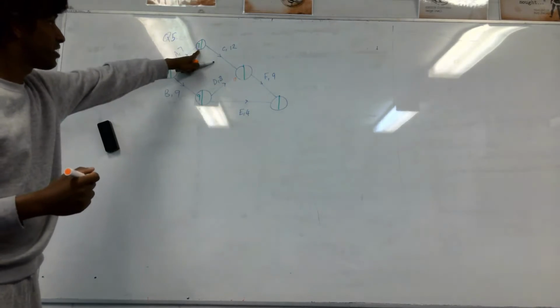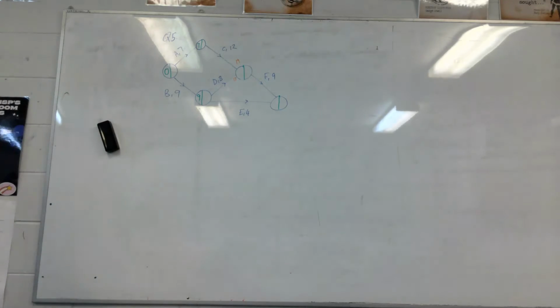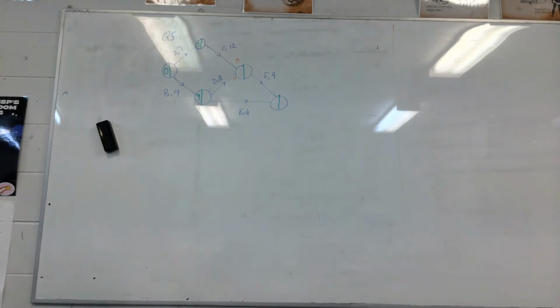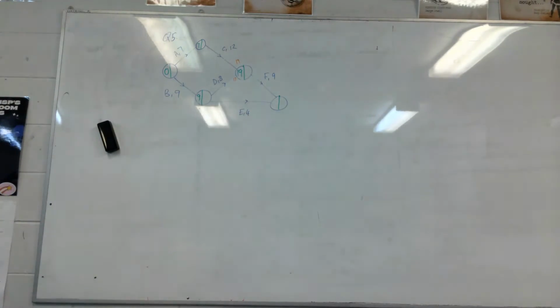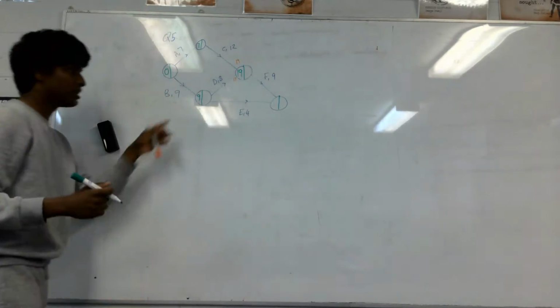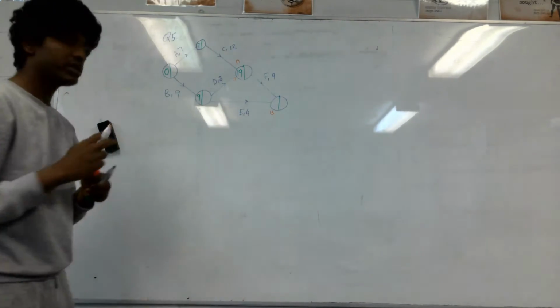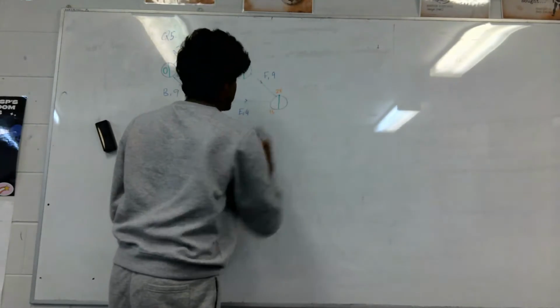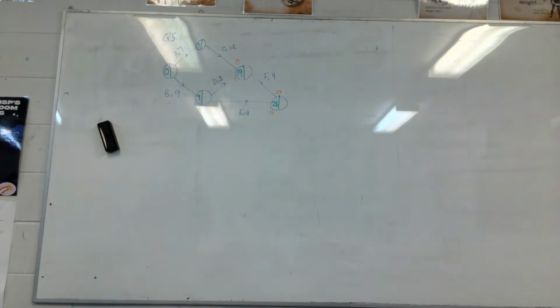And then coming this way we have 7 plus 12, which is 19. Obviously 19 is bigger, so we're going to have 19 here. Again, do the same thing. We've got 2 going into this one. 9 plus 4 is 13 here. 19 plus 9 is 28. So, forward scanning, those are the numbers in green we need. And you can see that on the recording, so that's cool.